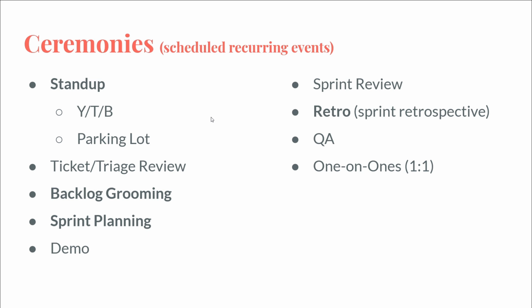So the sprint planning is, we know that the team on average pulls in about this much work, so we're going to pull in that much work, and we'll take it off the top and we'll decide, this is the highest priority stuff that needs to be worked on in the next 2 weeks. It needs to be done in the next 2 weeks. So we'll pull all that in.